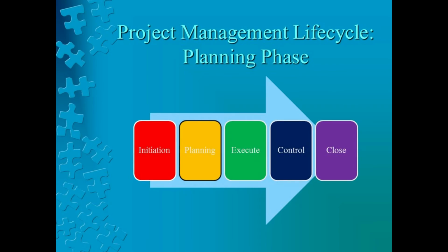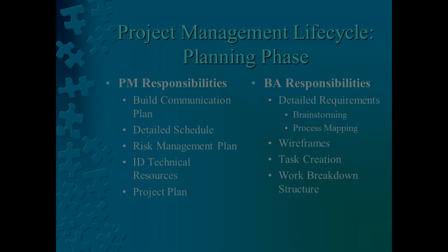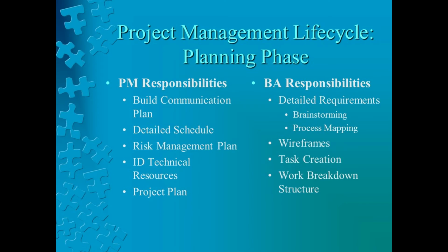The planning phase. During the planning phase, the project manager works to build out a communication plan, which details how often each specific stakeholder will be communicated to and how they will be communicated to. The project manager also pulls together a detailed schedule, risk management plan, and works with the technical leads to pull together the resources that will be required to do the work.